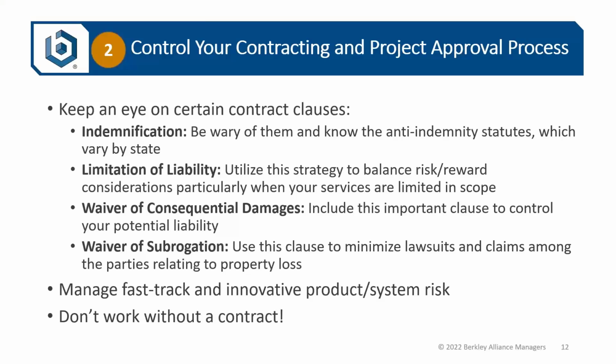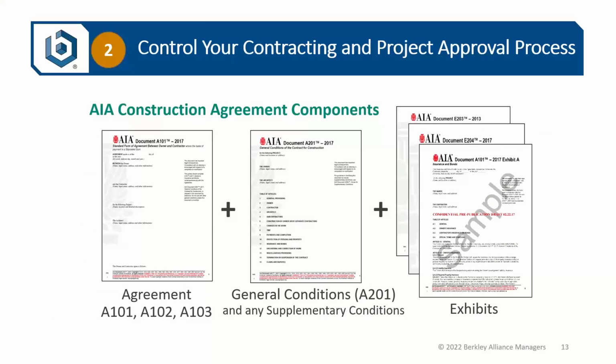If it's going to take some time to negotiate the full agreement, don't let this run too long, 30 days, 60 days. But if the owner wants you to start, you need to define what you're doing, what your scope is, what deliverables you may have, whether that be a cost estimate, whether that be a comment on the owner's program or the architect's preliminary design. And you need to be paid for that, and you need to be paid timely. So, of course, it's always better to get the full contract done before you start, but if not, make sure you have a valid letter of authorization to get going.